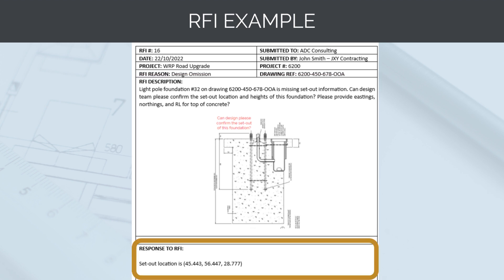The design team then responds with the requested information. Assuming this set-out information was correct, the construction team could then install the foundation in this location and close the RFI. The construction team would mark up this information on their redline drawing set, which we will talk about later on in this section, and the as-built drawings would be drafted to capture this.